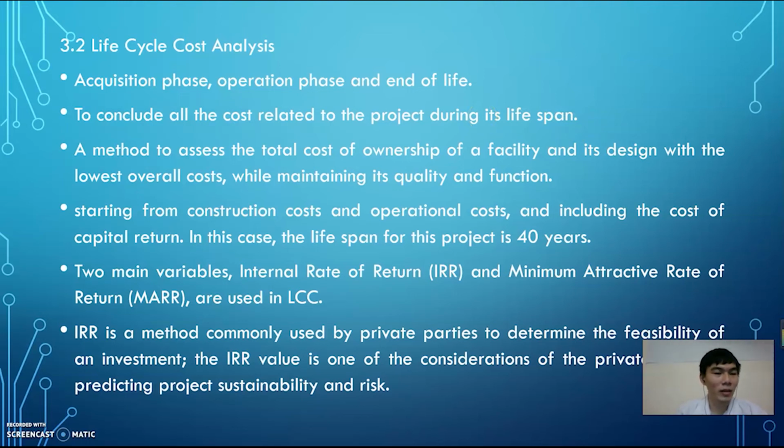Life cycle cost analysis can be divided into 3 phases, which are acquisition phase, operation phase, and end of life. It aims to conclude all the costs related to the project during its lifespan. It is a method to assess the total cost of ownership of a facility, and is designed to achieve the lowest overall cost while maintaining its quality and functions. It starts from the construction cost, operation cost, and includes the cost of capital return. In our case, the project lifespan is 40 years.